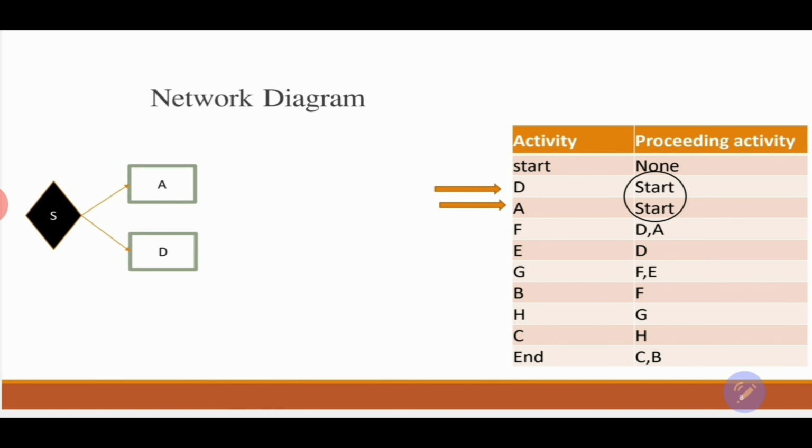So any kind of activity statement can be replaced with these letters, but only for the intention to make things easy and simple, I'm going to use the letters. On the other hand, the right column is presenting the activities dependency, and it's enough for us to mention the preceding activities or activity in order to know the dependency and the relationship between the activities.